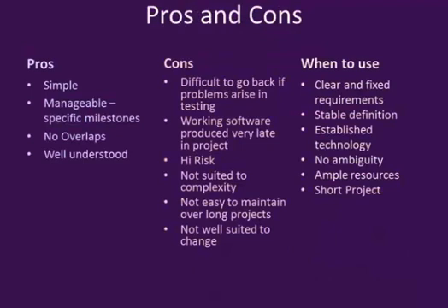The waterfall model is suited to short, simple, well-defined projects. It is very well known and widely taught. It does not deal with changes such as changing technology, scope drift, or ambiguity. On long projects, it can go seriously off the rails, with the project manager devoting all his time to updating an increasingly inaccurate project plan. I'll give you a few moments to read the pros and cons.